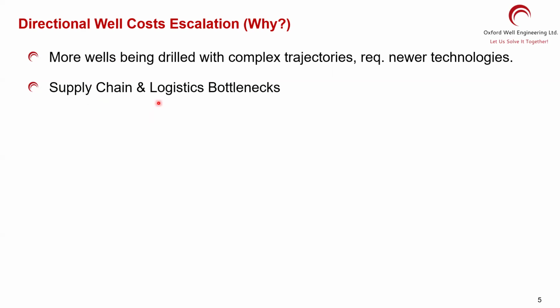The kind of fancier items you are putting in the complex wells, the harder to get the supply chain working for you. And people have everything available basically. And sometimes they have to buy double the equipment. Sometimes they have expensive parts sitting on their yard. Why? Because they don't want to wait for it. If it breaks, they have a backup. They buy too many.